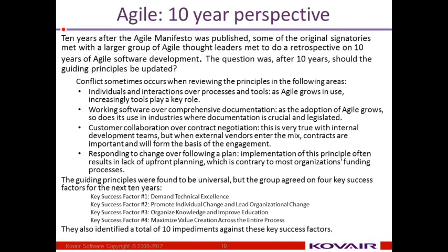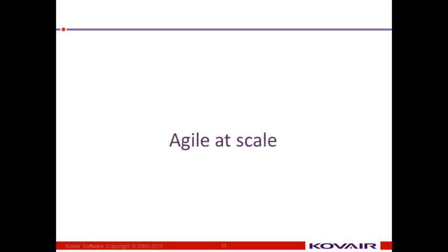I do not want to get into the details of those 10 impediments within the short scope of this webinar, but one of the top impediments was that the teams actually lack enough backlogs. Most of the time it is found that they are not ready with backlogs, and there are lots of reasons for this. Some of the important symptoms are that in the early stages you compromise with some of the key principles, and that's when you defer a review, and therefore you don't know whether you completed something or not, and even if you had actually not completed something, it does not make it to the backlog. This is just one example. There are other reasons leading to a situation where your one sprint is done, you are ready for the next sprint, but you do not have enough backlog.